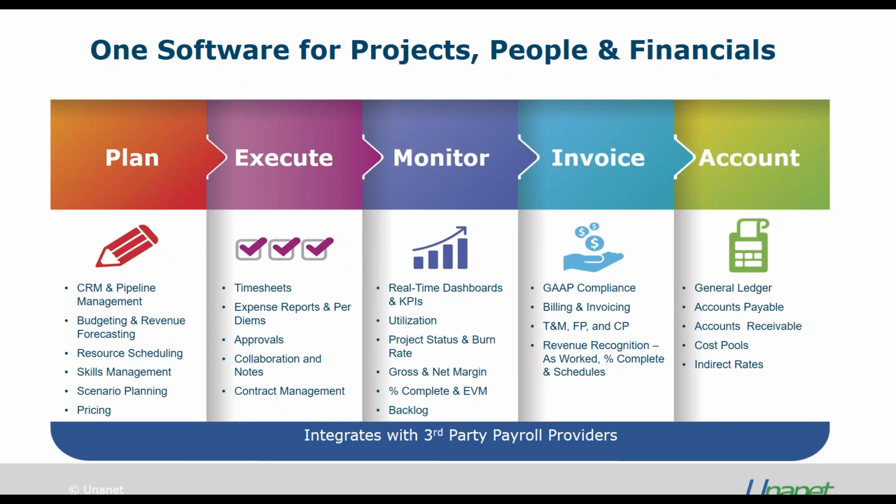Continuing to the right, as you're delivering that work, you can also invoice against it, whether that's a time and materials project, a fixed price project, or a cost plus project, which many of our government contractor customers will have and require. And then there's a host of different revenue recognition methods, whether you're recognizing the revenue as you work it, based on a percent complete, or based on a custom schedule that you might enter.